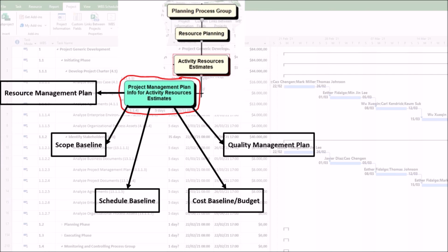5. Quality Management Plan. It defines how well the required quality standards and processes can significantly impact resource needs. Higher quality standards might require: first, more skilled and often more expensive personnel. Second, specialized inspection equipment. Third, additional time for testing and rework, which consumes more resource hours.